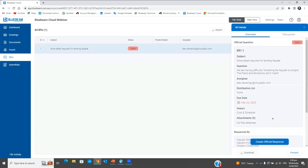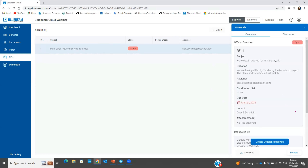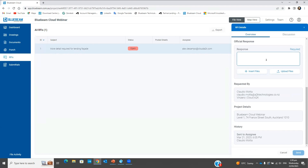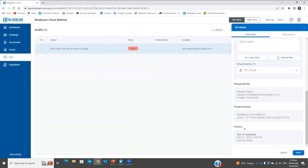When you see an RFI and you're not the one who needs to respond, or you need insight from someone else, you can forward the RFI. You'll forward it to as many colleagues as you want and start a discussion. This discussion populates here and everyone with access to the project will know what's going on with that RFI. But what I want to do is create an official response straight away — just like in Review, I'll upload the response file and send it.